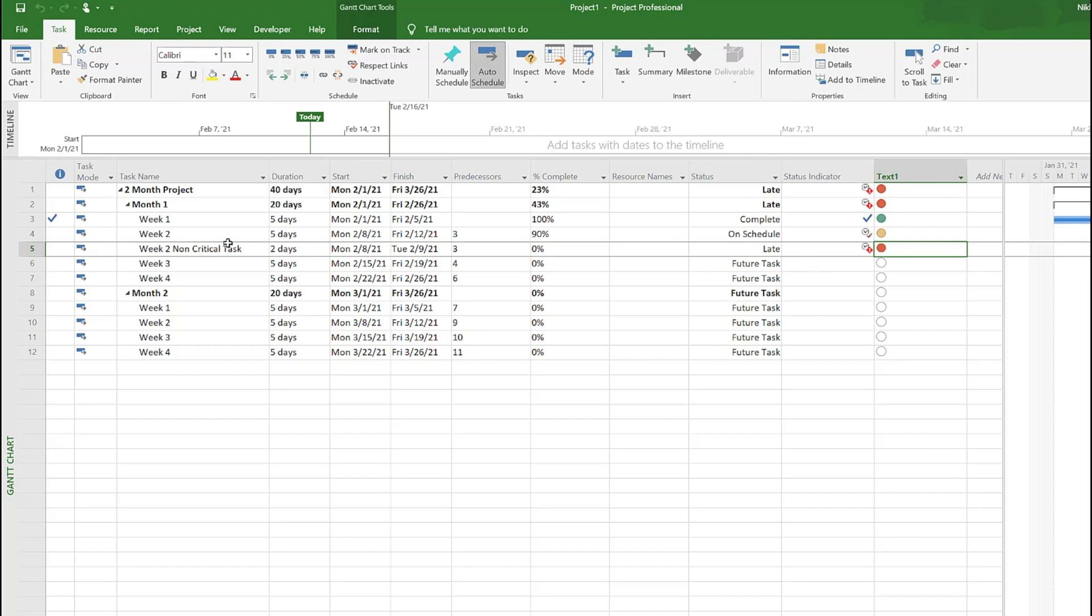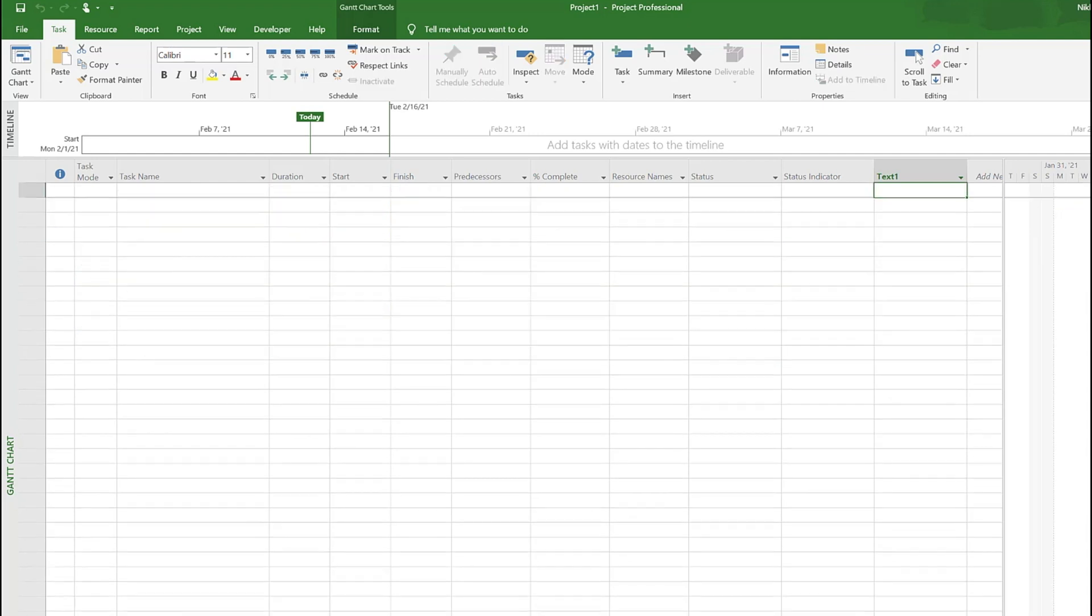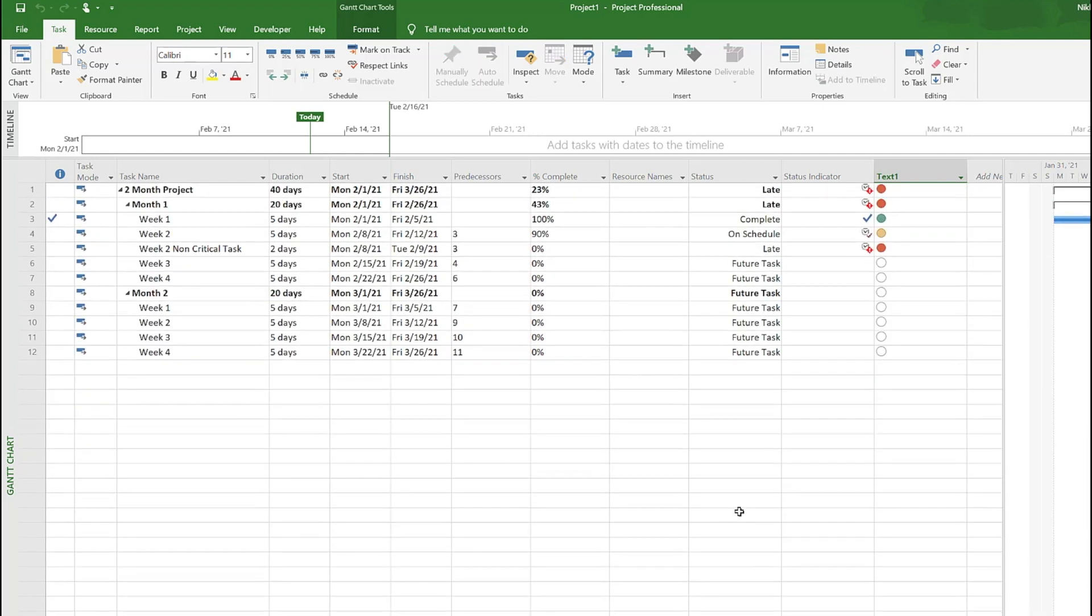The status here looks at an individual task and the end date and compares against the current date which is the 12th, and then comes up with whether it's late or not. So it may not be a true impact to the project, but a quick visual indicator to let you know what individual tasks are running late. Just keep that in mind.